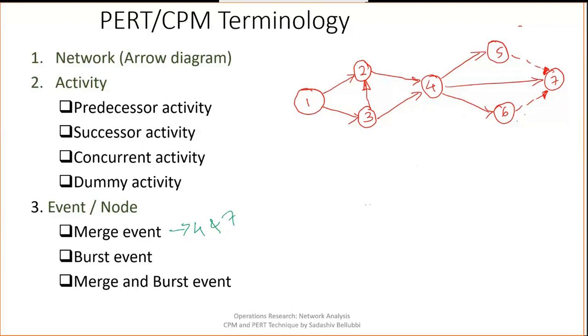A burst event, the name itself says it. What do you mean by burst? From here it will blast. When more than one activity leaves or departs from any one event, we call such an event a burst event.